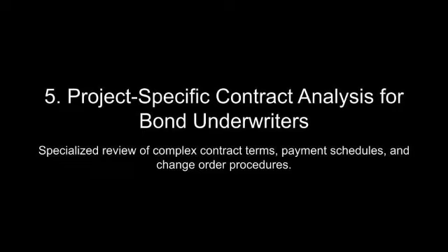The scope of indemnity can vary widely, from narrowly tailored agreements covering specific risks, such as property damage or third-party injuries, to broad, all-encompassing clauses that attempt to shift nearly all liabilities to the indemnitor. The enforceability of such broad clauses, however, often depends on jurisdictional limitations and public policy considerations, as courts may view overly expansive indemnity agreements as inequitable.